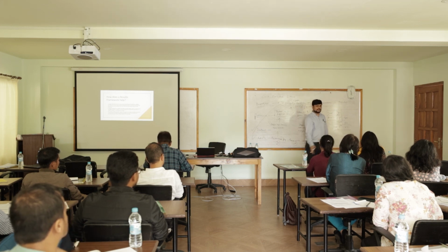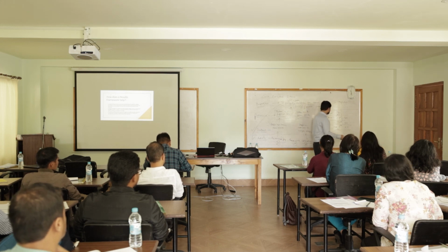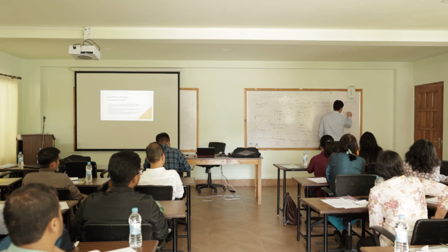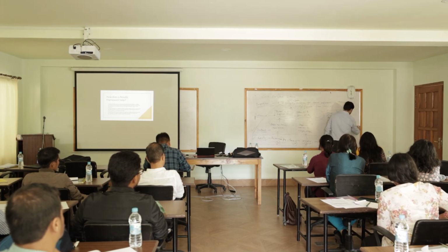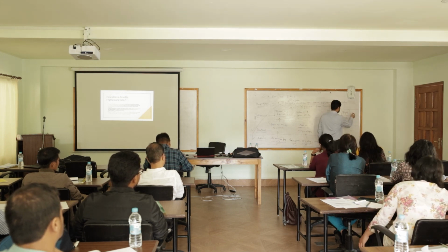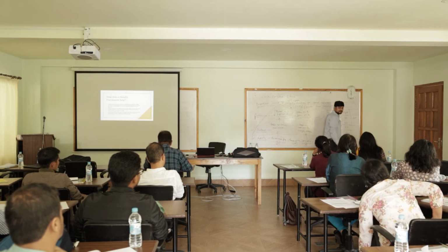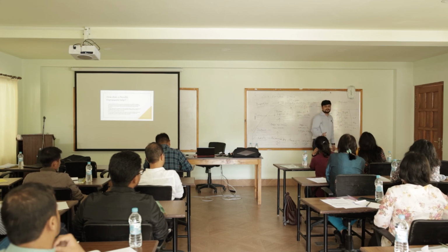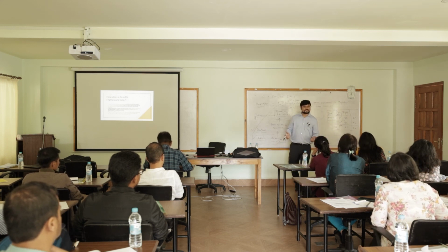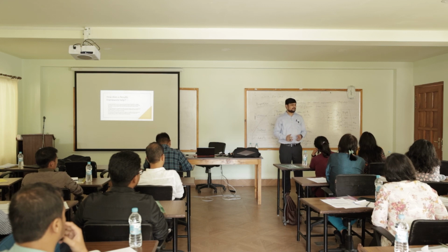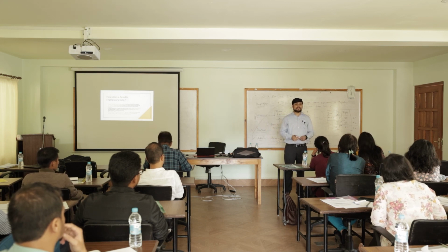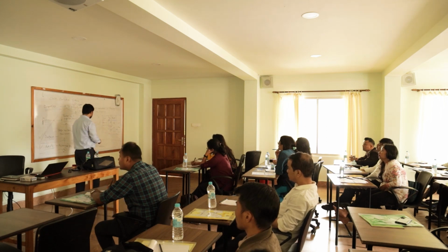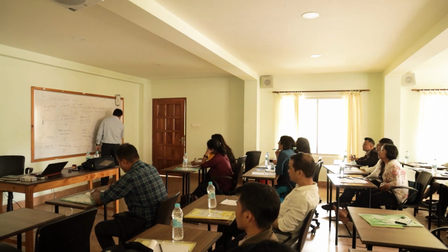I can have the plan for the entire year. Backlog also. And they can be a backlog. And what will happen is these are the targets that you have set, and when you're going for an evaluation, you simply look into whether 20 were conducted here or not, 40 were conducted or 60 were conducted or not. If yes, what worked for the project? If not, why did it not work for the project? That is also a learning. So certain change even in between need to be done. Right.